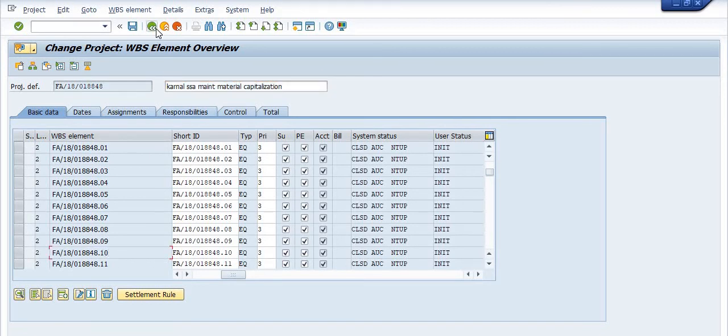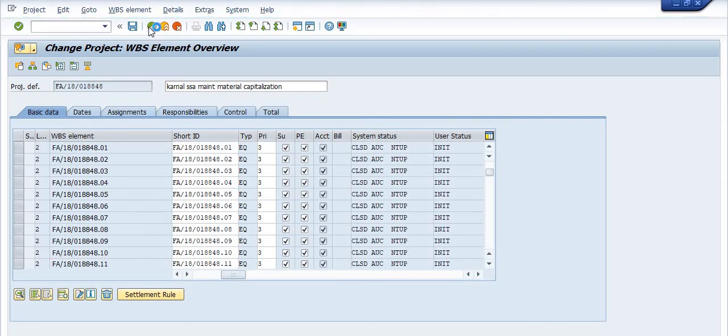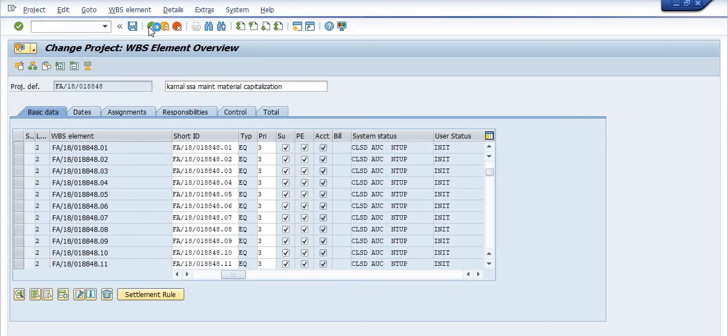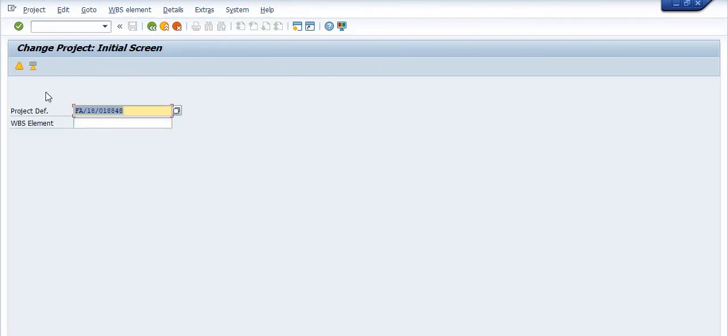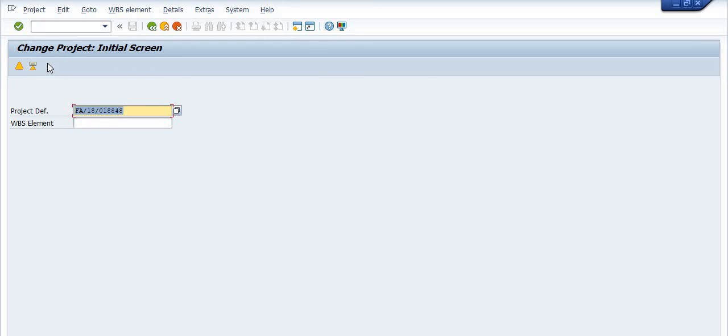Previously we were getting error in this WBS because project stock had been planned with this WBS. Using this method we are closing the whole project. But you are not able to close the CRTD state WBS using this method. You are able to close those WBS which are already completed in the PAP status. This is the way how you can close the open project which are in the created state in which no work has been performed. Thank you for watching, have a nice day.